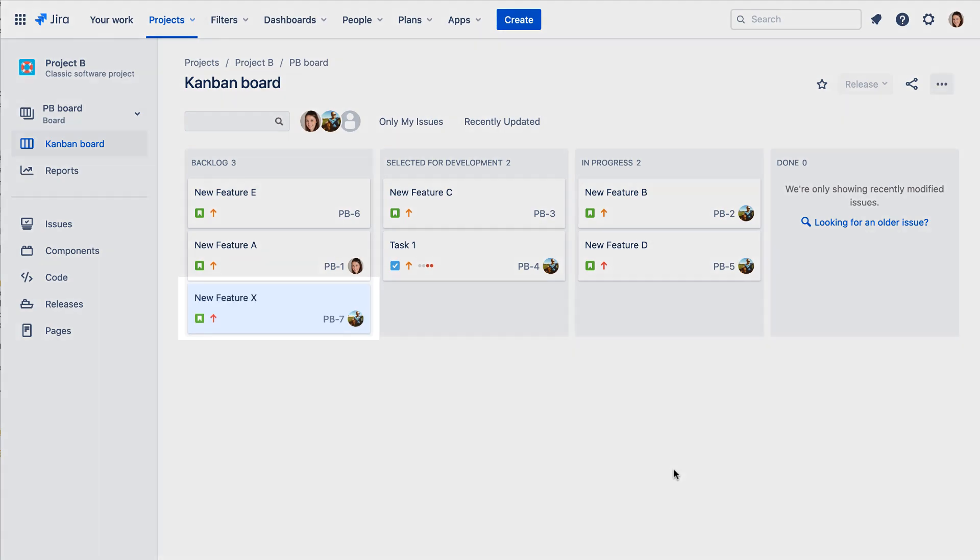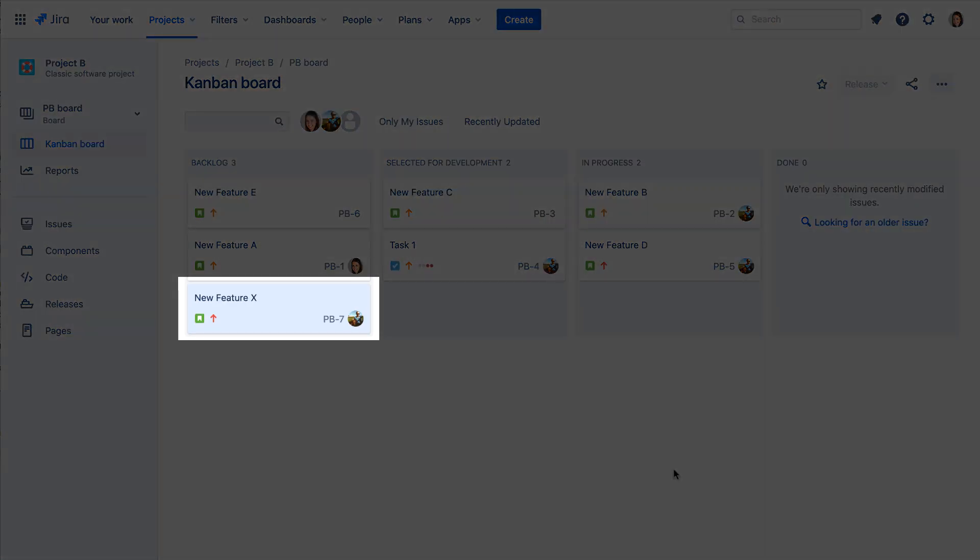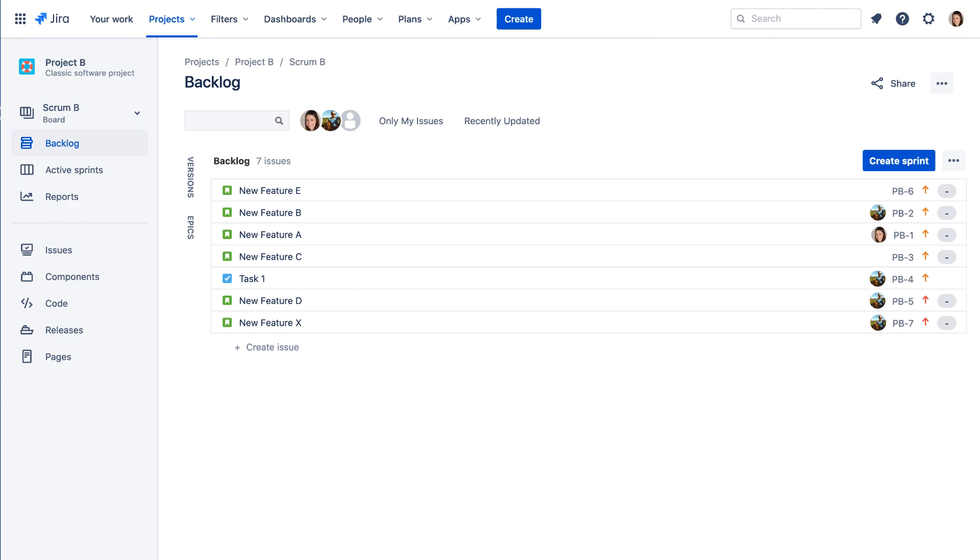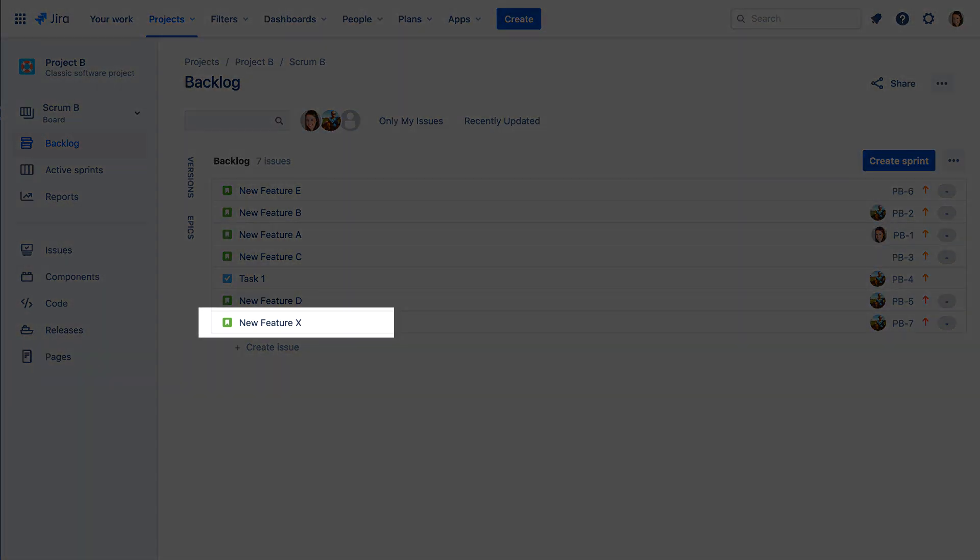Your newly created issue can be found on the project board, or in the backlog if you're working in a Scrum project.